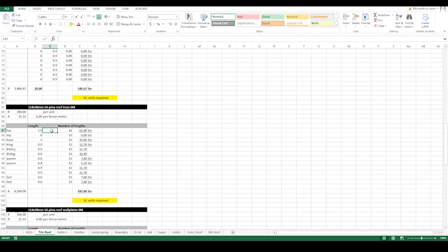It's 18 meters all around, all the way to the bottom. And then under here I'm going to say sum of 18 divided by 1, which is going to be 18, obviously. And then that formula, I just transpose it to the other cells below it. Now, this is going to multiply this by that, which gives me linear meters.